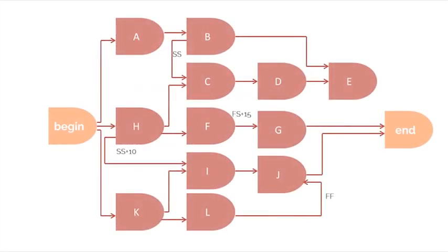The key output is project schedule network diagrams, which are graphical representations of the logical relationships, also referred to as dependencies, among the project schedule activities. Here you can see what this looks like. As you can see here, the schedule network diagram visually depicts how all the tasks in your schedule string together. While the WBS shows you how many tasks you have to accomplish, the schedule network diagram shows the order those tasks need to happen. It's a great way for starting to understand and visualize how your project will proceed.